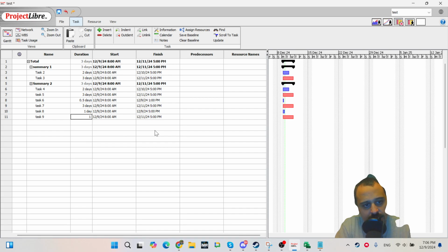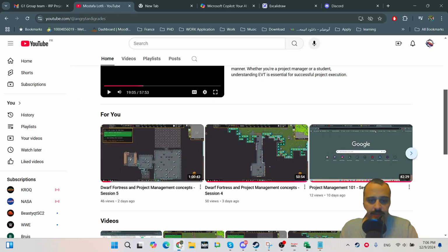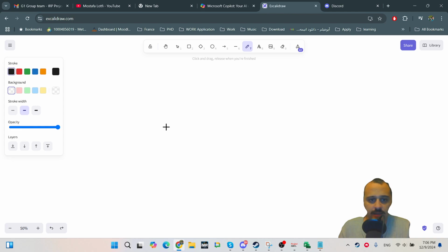Okay, now for the next one, I'm putting 1. Look at this here, e-days. I'm using e-days, exception days. But when I put the e-days, it automatically converted to 3 days. Okay, so what happened is, basically, when I put 1 day, 1 day is equal to 8 hours, right?